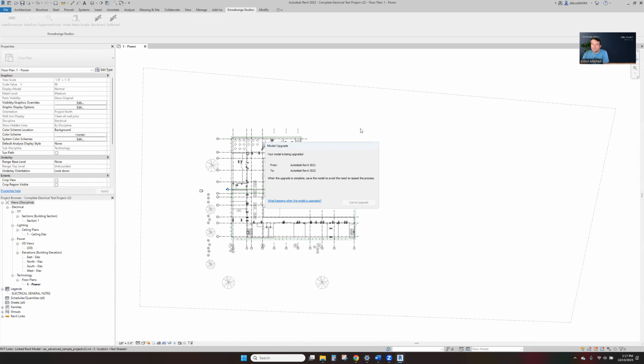But for a standard project, you're looking to, again, just get counts, takeoffs, all that. And even for traditional design bid build, it's asking for the Revit models of the design team. There's going to be some pieces in that where you want to make sure that the model you're getting has everything. You're going to have some checks and whatnot in there because people don't model everything.